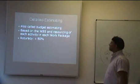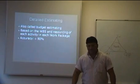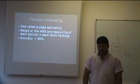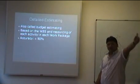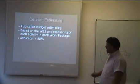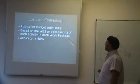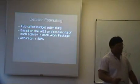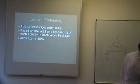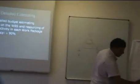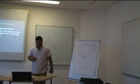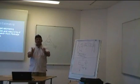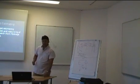If I go to detail estimating, let us just quickly look at what detail estimating says. The detail estimate is also called budget estimating. It is based on the WBS, which is the work breakdown structure, what we've done in the scope of work and scope management process, and resourcing of each activity in each work package. Remember what we said when we do detail estimating in terms of your work breakdown structure. As you go down in the work breakdown structure, the lowest level is the work package level. So the detail estimating is based on the WBS at work package level.